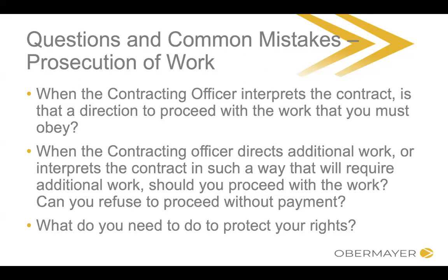So when the contracting officer interprets the contract and tells you, hey, I'm interpreting the contract this way, this is what you need to do. Is that a direction to proceed with the work that you must obey? Yes. You want to give notice saying that it's a constructive change so that everyone's on the same page, but you're not allowed to say, hey, I don't agree that I have to do that because that's not in my original contract, so I'm not going to do it. If you do that, you're going to get terminated for default. So it's a big red flag, a big danger area.